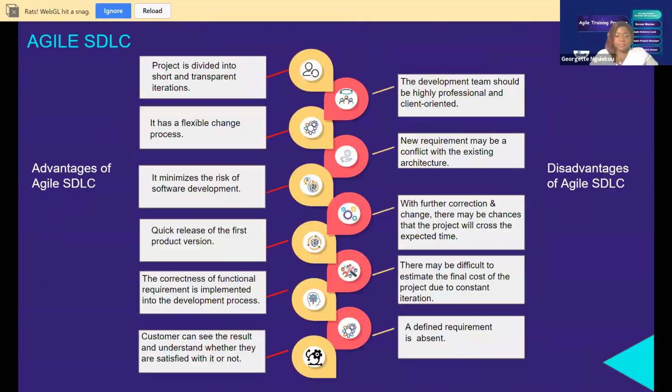These are the advantages and the limitations of Agile. Agile is not always the best work, right? There are certain projects that are not really good with Agile. What are those projects? Some projects are really waterfall based. The project where the requirement is so clear that you know from the beginning to the end that you don't change the requirement, waterfall is best for that. And waterfall is more simplified than Agile. With Agile, even if you don't know all the requirements, you can start and adjust as you move on. But with waterfall, you cannot do that.